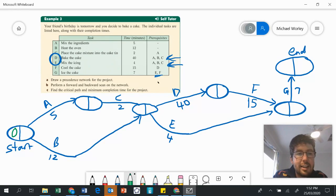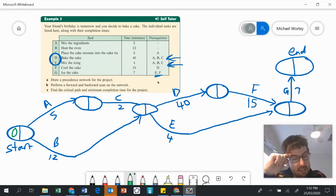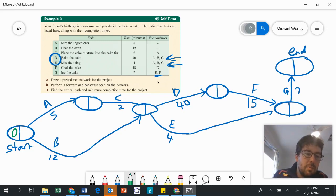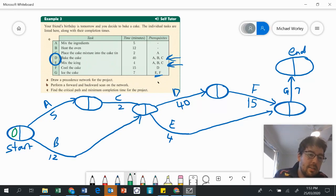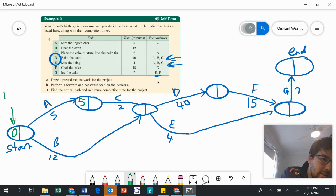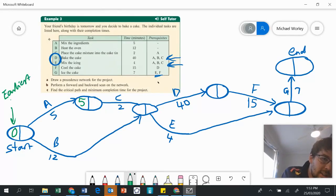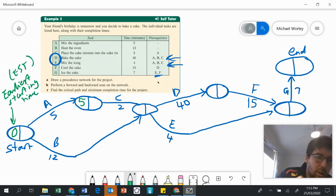Think of this as timing how long it takes for the cake to be made — assume you start a stopwatch at zero minutes. When we do our forward scan, we add how long it takes each time to complete. Going along the A link: zero plus five is five, so we put a five there on the left hand side. Remembering the left hand box shows the earliest starting time, otherwise known as EST. Zero plus five is five.